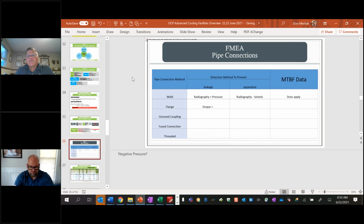Okay. And so if you go online and look at how to commission a flange or how to install a flange, you'll see it has a fairly detailed procedure. Number one, you do a bolt rotation pattern. You fully load the flange. You come back 4 hours later, because you have a certain amount of plastic deformation in the gasket, and so you retorque it then. And anytime you think there's pipe movement or has been pipe movement, you may have to go back and retorque.